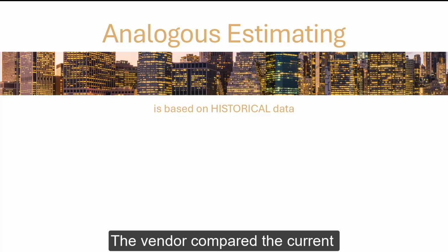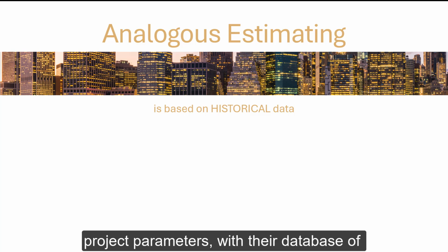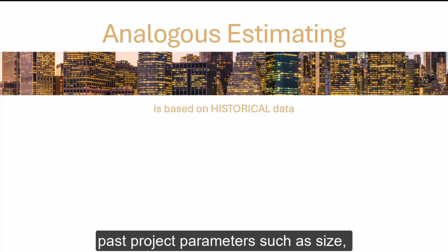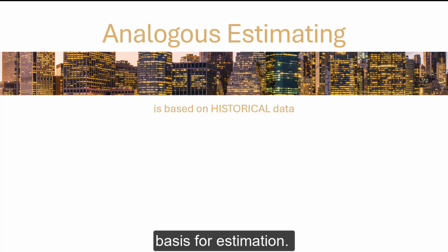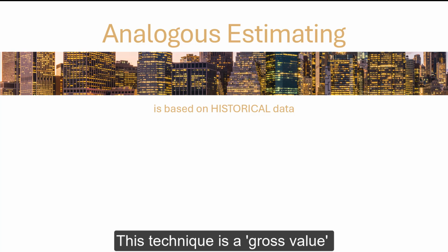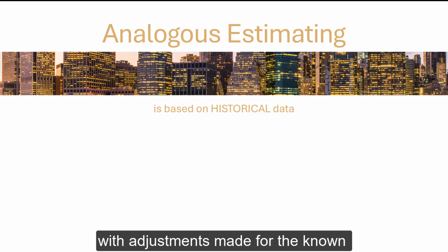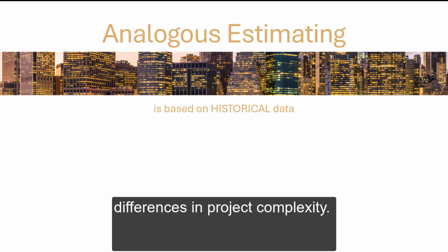The vendor compared the current project parameters with their database of past project parameters such as the size of the project, complexity, duration, and budget as the basis for estimation. This technique is a gross value estimating approach with some adjustments made for the known differences in the project complexity.